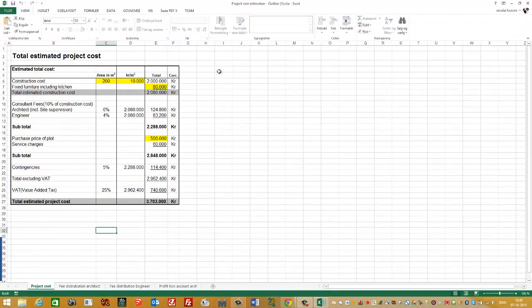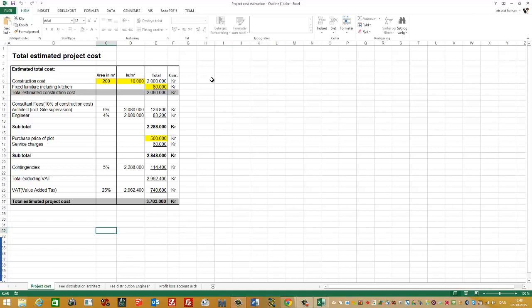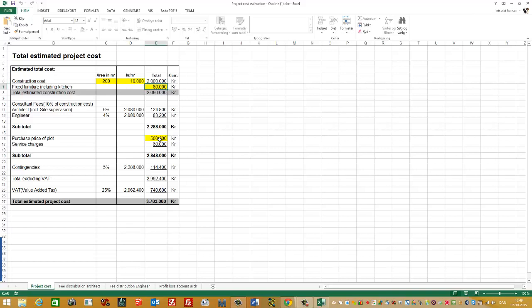Here you see a table showing how you can make the total estimated project cost. The thing you need to change is the yellow fields. You need to put in the area of your house, the square meter price in Kroner, the price for the fixed furniture including the kitchen, and find out the price of the plot. When you make this, you need to have documentation for all of this.